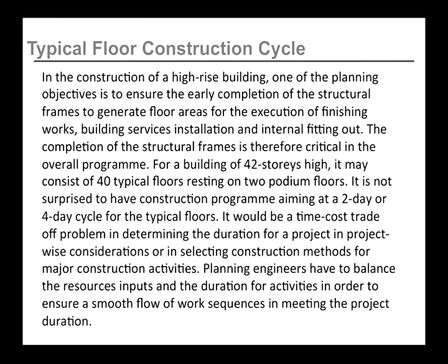Typical floor construction cycle. In the construction of a high-rise building, one of the planning objectives is to ensure the early completion of the structural frames to generate floor areas for the execution of finishing works, building services, and installation and internal fitting out. So it is imperative that any high-rise building has to be completed within a very fixed timeline.